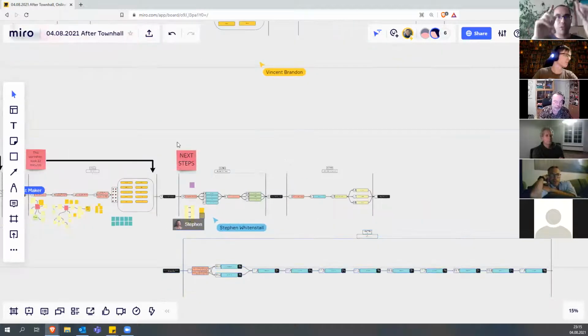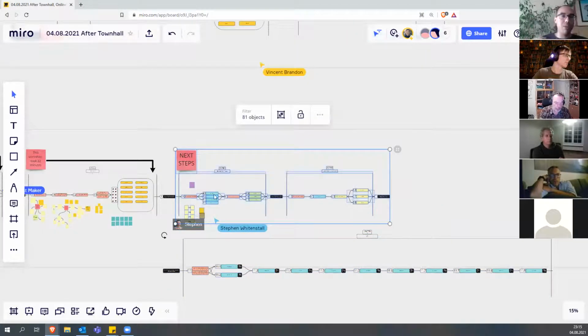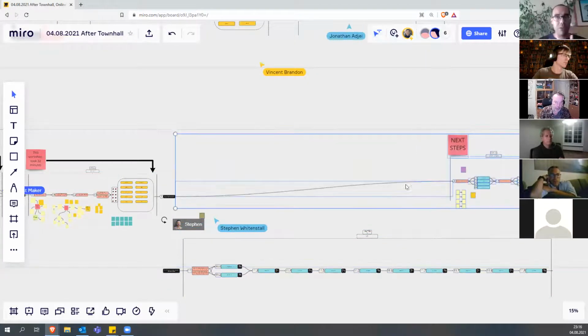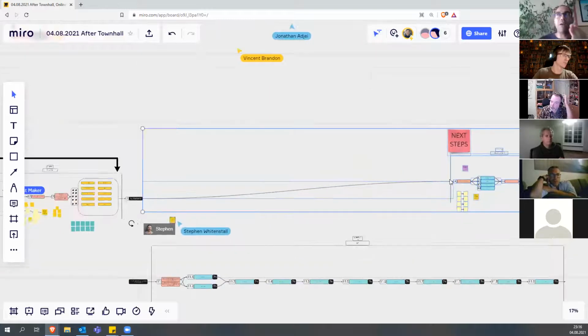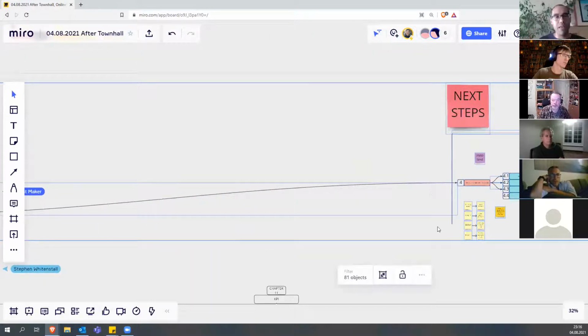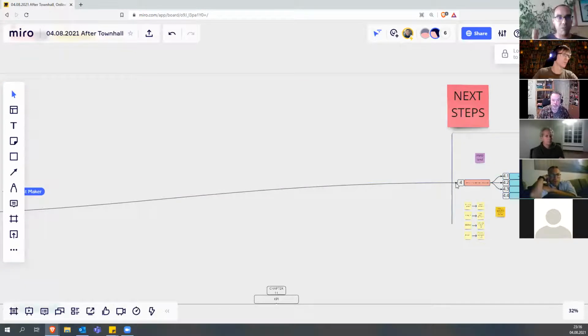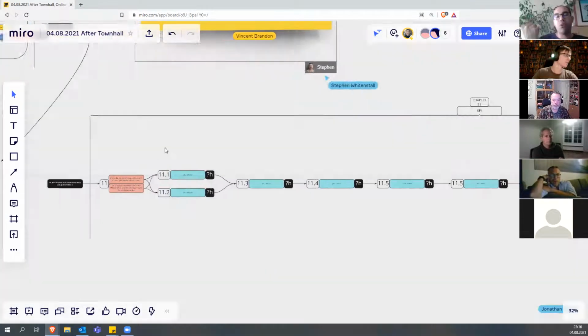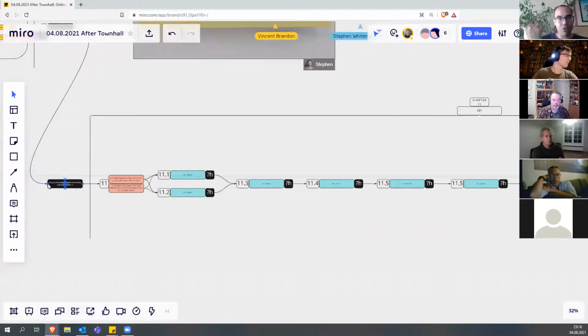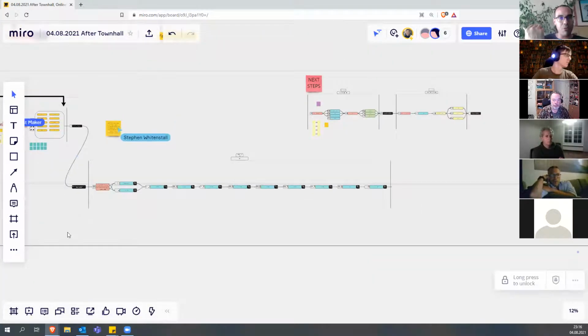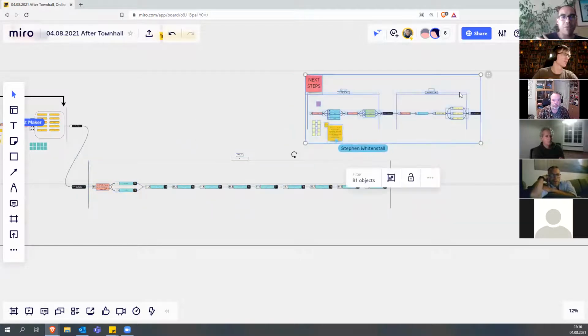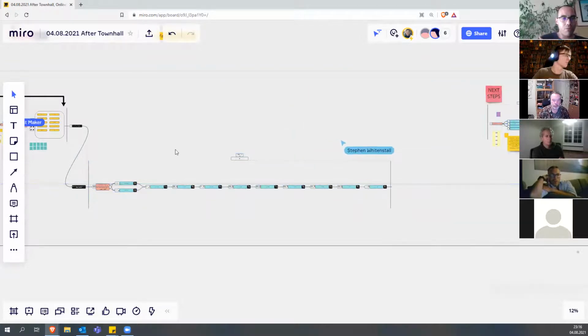We can say, we need to do this, this, and this. People can say, okay, it'll take me, or somebody that I know, about X hours to do it. And they would bill, we can go online and get those billings for that task specifically, or estimate it. However, we just know right away whether or not the scope of the problem is within the mini proposal budget. Does that kind of make sense? That's what I would say for 4. That's my input.